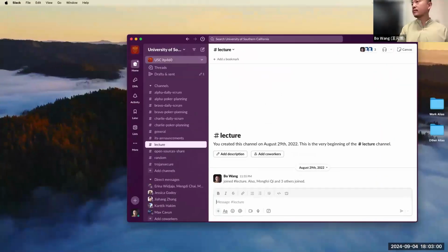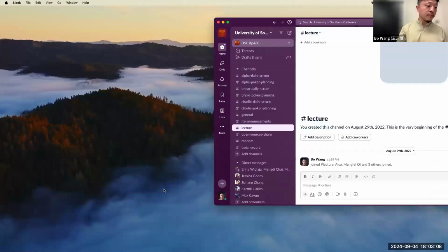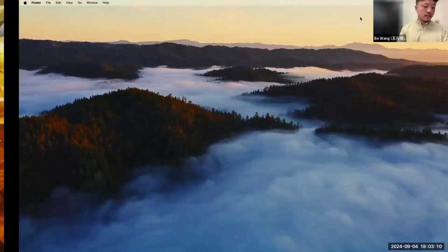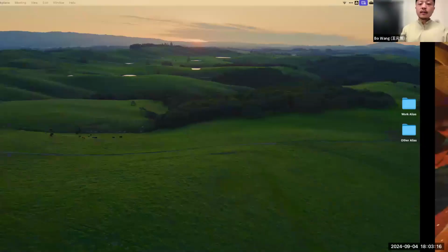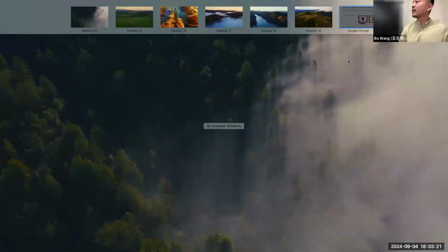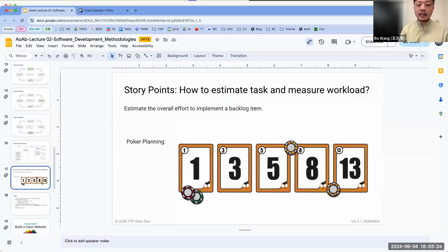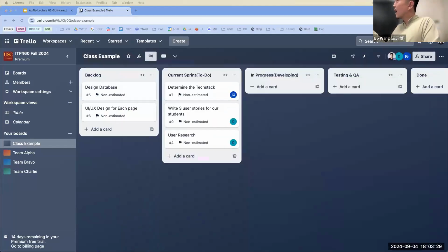And don't talk to each other, besides asking a question about how this task can be done. Hold on. Okay, for task number 9, I'm hiding myself, so I don't want John and Diane to see this, and I will show you the result in a bit. All right, ready? We'll put a number to estimate task number 9, just the 3 of us. 1, 2, 3, send.